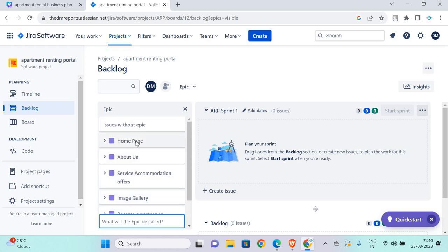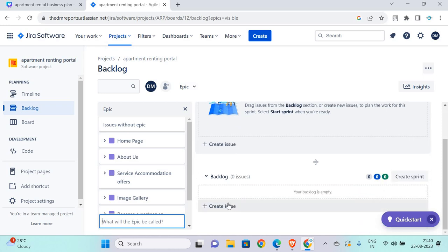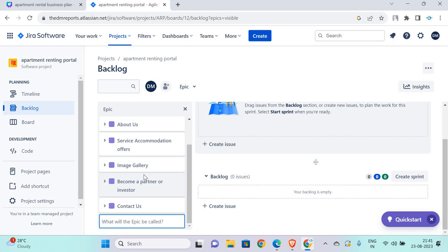Now each of these epics will have stories. If we break these features into smaller parts, smaller sizes, that will create the stories here. I'm going to write stories next, but before that I would like to inform you that with this sort of epics you can launch a small scale product in the beginning, when you have a small number of apartments and are trying to promote those apartments in the beginning days. So we would recommend that you start with this sort of feature.